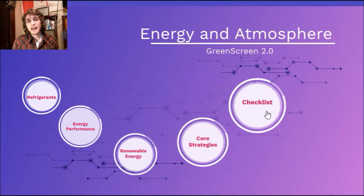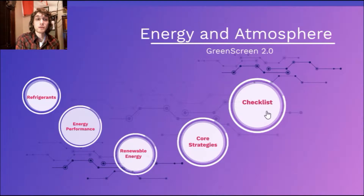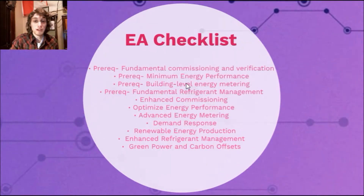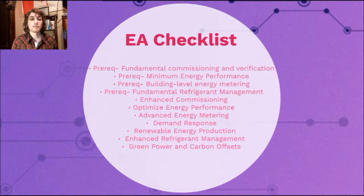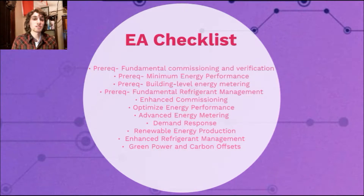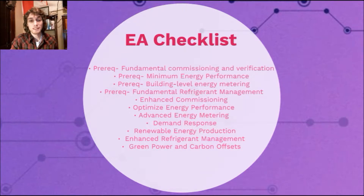This follows really every LEED category — it starts with establishing a baseline, then reducing our demand, and then ends with tracking our progress. We can see that right here in the checklist where the prerequisites are establishing that baseline, and the same on the bottom for the actual credits: fundamental commissioning, enhanced commissioning, minimum performance, and optimized energy performance. The EA category is one of the most important, if not the most important, because LEED V4 was really designed to reduce our impact on climate change, and credits are awarded due to the most impact — that's why EA has the most credits in it.